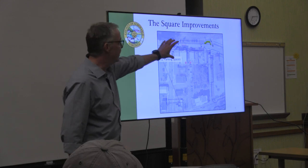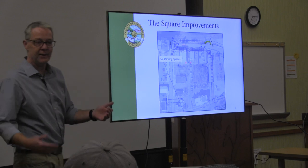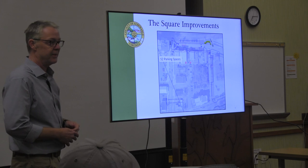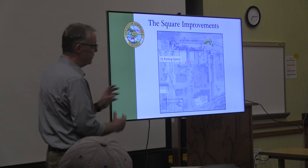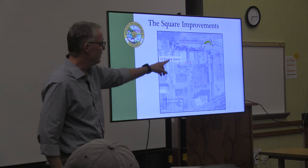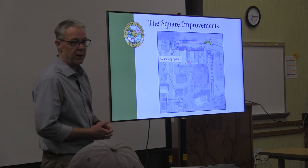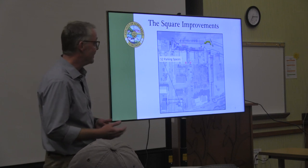The next slide's going to zoom into this area a little bit, but I'll just note the portion in yellow right now, right there, is where the fence line comes out for railroad access. One of the challenges that held this project up was negotiating with the Department of Rail and Public Transportation, which now owns that railroad, just to get them to pay attention to let us move that over so that we pick up more parking on the fringe of the businesses and have an easier access point for the railroad to be able to drive up Oak Street and then access their property. So we finally got that paperwork for the transfer of property signed about a month ago. And so we're moving at a high rate of speed after a lot of time.